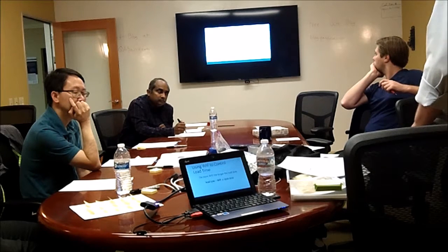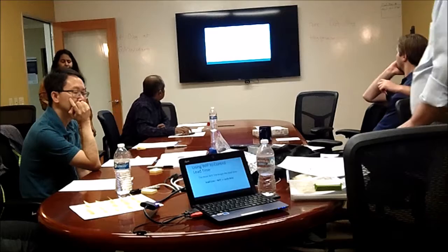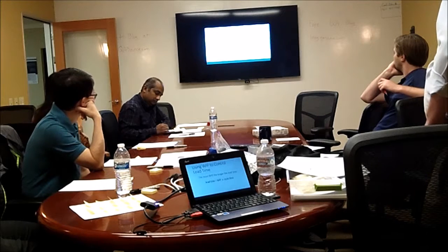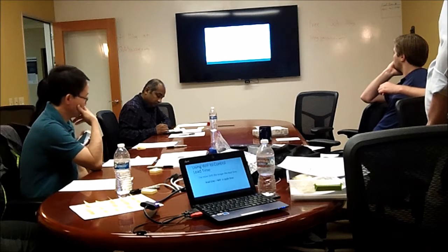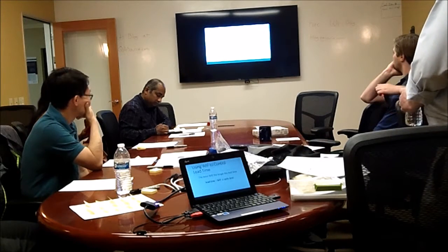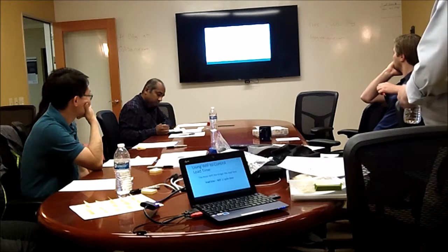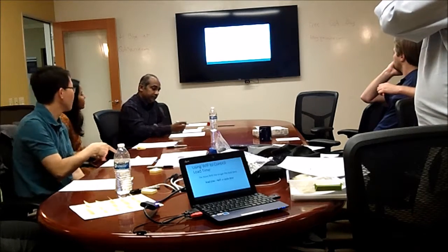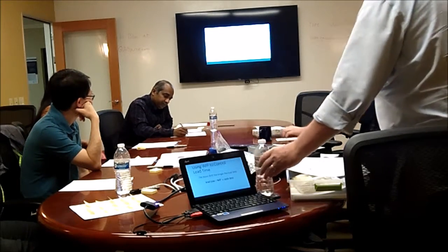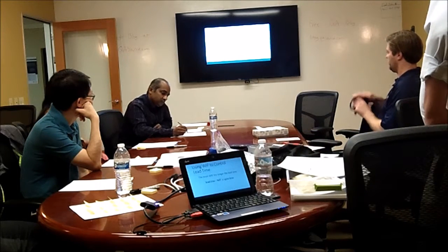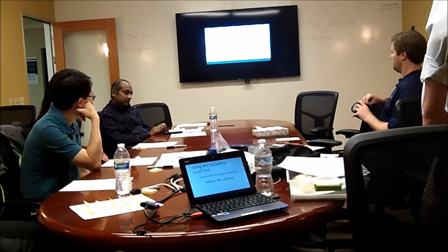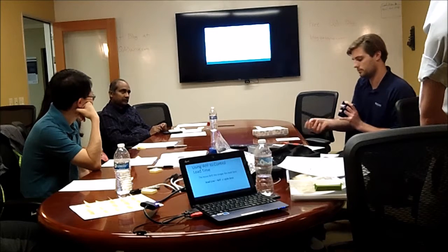The more WIP, the longer the lead time. And here's the simple formula that ties these things all together. The lead time is the number of units of work in process times the cycle time. So you can fill out that sheet and give us a lead time for this second phase that we did, round 2. Oh, okay. 80 seconds, plus second time is 32 seconds. So the lead time went down considerably in the second phase. So what are the numbers? 80 in the first round, 32 in the second round.